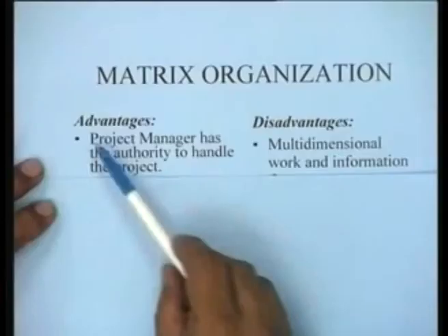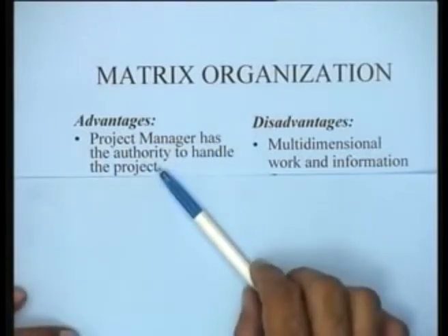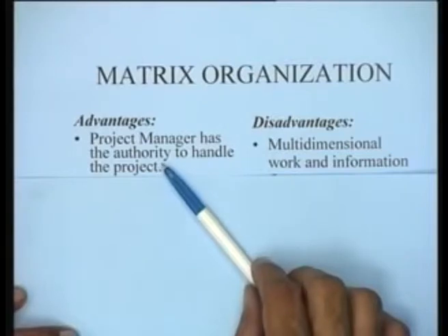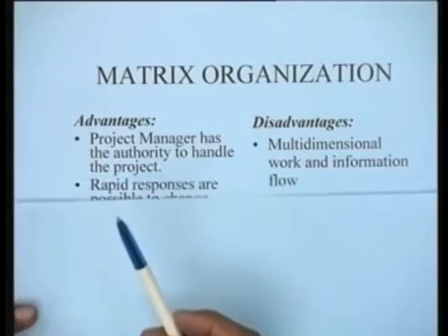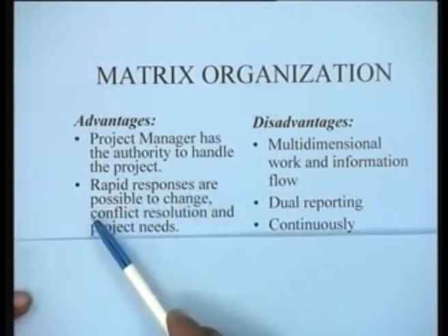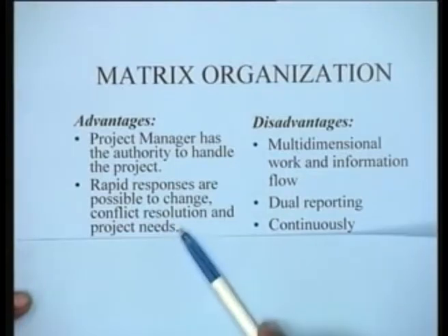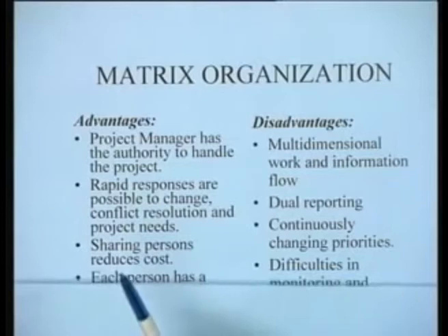The project manager, the major advantage is that the project manager has the authority to handle the project. That is one thing. Each project has a project manager defined, and he has the authority to handle the project. Another thing is that rapid responses are possible to change, conflict resolution and project needs in this case. So, we are trying to get some of the advantages of the pure project organization in this particular framework.